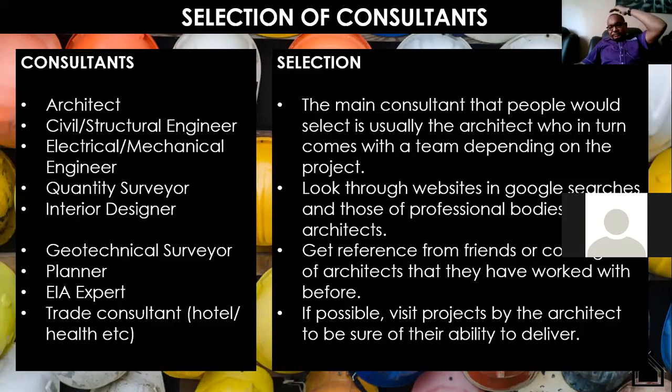Then we have some other consultants who we consult once in a while. We have the geotechnical surveyor who tests our soil. At times, if you get into a project without doing proper tests, you might start construction, and as you're doing a foundation, you find a very huge, massive rock that becomes too expensive to blast. Or you can find loose soil that is too deep, and you hadn't planned for all those scenarios. Then it becomes very costly, and maybe you wouldn't have budgeted for it.